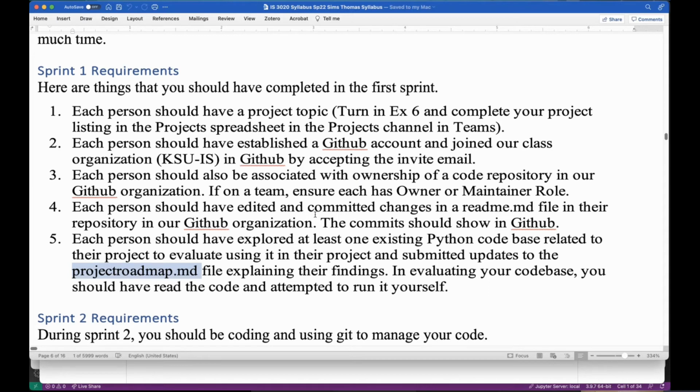Anybody want to guess the project failure rate for technology projects? Over 85%. Not complete failure, but partial failure, over 85%. Complete failure, between 30 to 50%. What size is that in the capital IT projects, capital technology innovation projects?